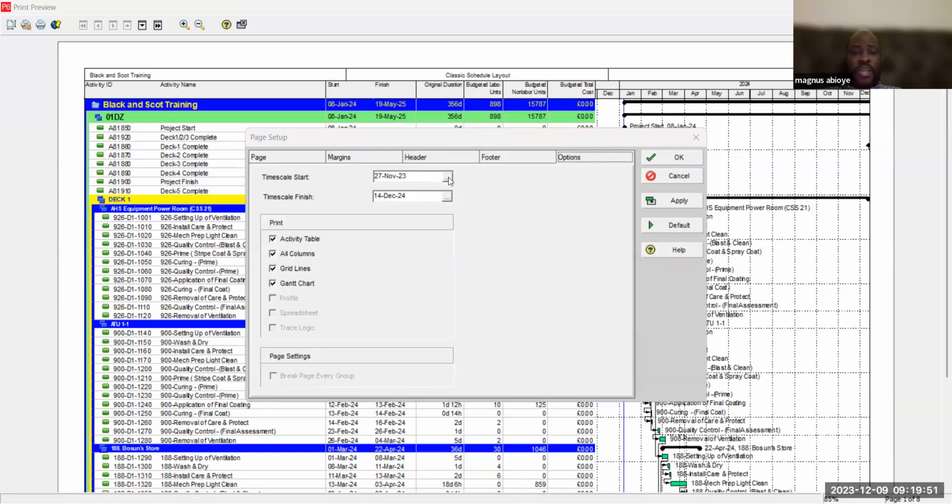I would like to start on the current date or the earliest project date and the earliest and the latest project finish, and I will put at least 1 month. So that's plus 1 month, and this minus 1 month. If I put minus 1M, that makes it 1 month away from the earliest project start and the latest project finish.